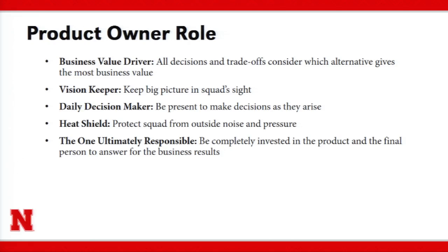If you can imagine, the team times are 8 to 10 hours a week. It's not like you and I working Monday through Friday. They may work Monday, Wednesday, Friday. Well, if the question isn't answered on Monday, they're not going to meet again until Wednesday. Then they might not design that till Friday, and then you might not see it till next Monday. If you had a delay in answering their question, can you imagine the cascading effect of that, because they're not meeting 40 hours a week like we are?